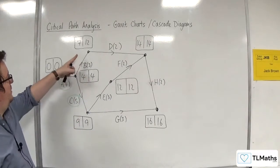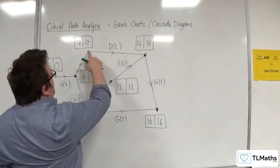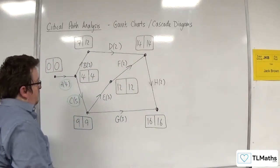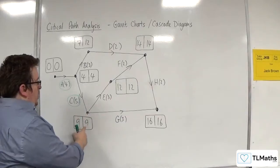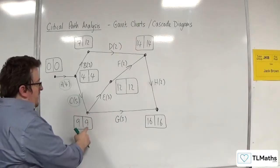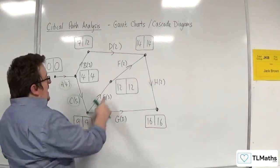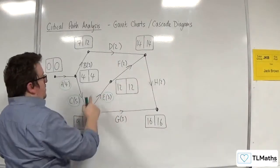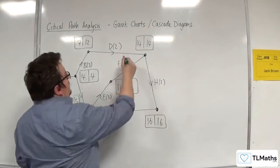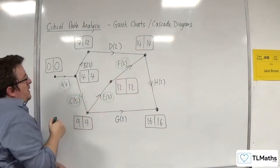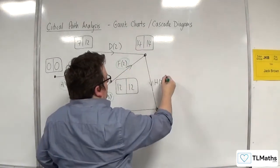B is not critical because of the 7, 12, and that means D is not critical either. G is not critical because 9 plus 3 is not 16. E is critical - 9 plus 3 is 12, and so F has to be critical, and H is also critical.